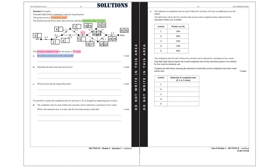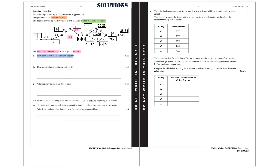For activity F, again we have 16 minus 1 equals 15, coming from activity G, and 17 minus 1 equals 16, coming from activity H. We continue like this until we finish back at the start. Now to determine the critical path, remember we need those boxes where the two numbers are the same — where the early starting time is the same as the latest starting time. The activities on the critical path are A, B, D, F, G, I, K, and L.